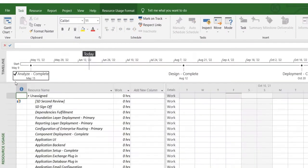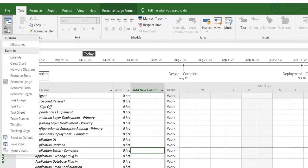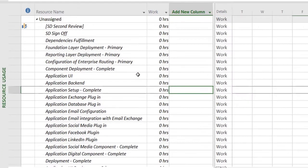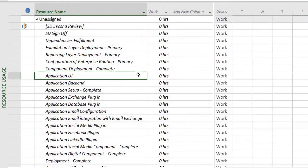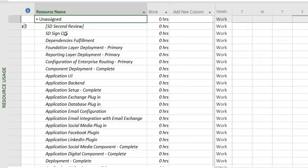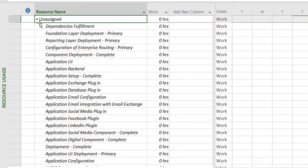And you can cross check this in the Resource Usage sheet. The Resource Usage sheet basically shows the work distribution of each resource in a project plan.